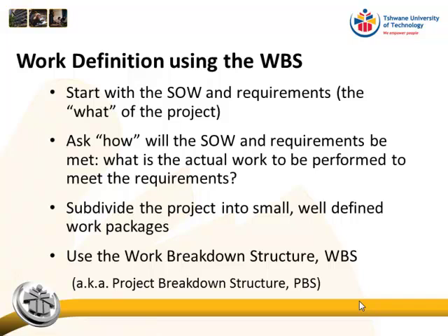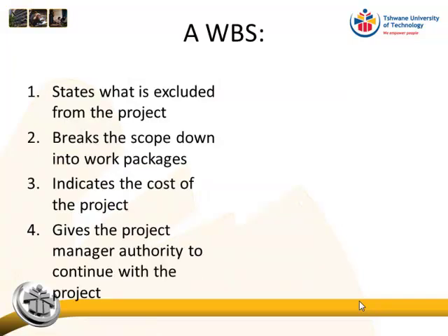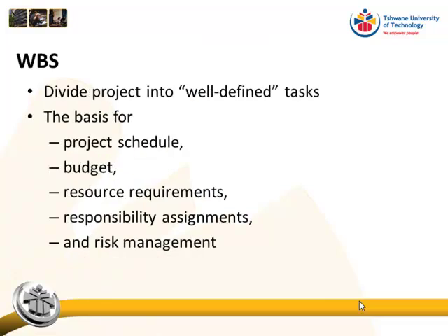Okay, so with a work breakdown structure, what we do is subdivide the project into small, well-defined work packages. So it's a work package that we can give to somebody to say, this is what you must do on the project. Okay, this we did last time, so we won't do that again.